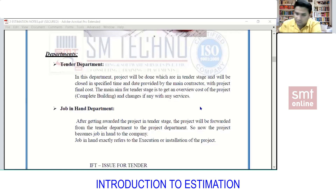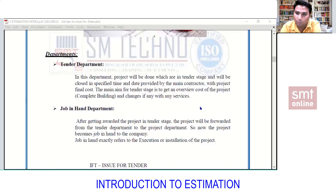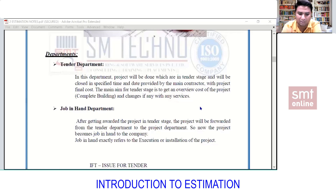Now, the job-in-hand department: they work on projects that have already been awarded. The job-in-hand department is on the execution side — it includes draftsmen, site engineers, and designers. In short, the job-in-hand department consists of the people who execute the work. This is interrelated to the tender department, because the cost quoted during the tender stage becomes the budget for execution.